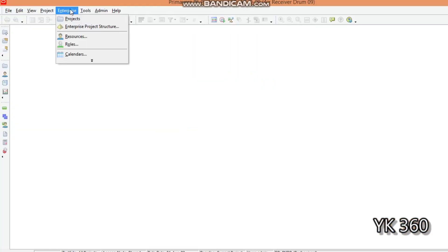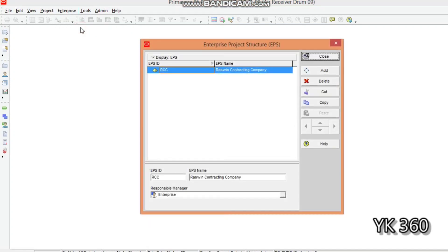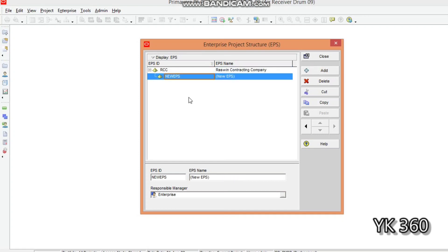To create a new EPS in Primavera software, go to the menu bar and open the Enterprise tab. Click the Enterprise tab and select the second option — Enterprise Project Structure. You can see there is already one EPS created from a previous lesson. To create a new EPS, click the Add button. The new EPS appears under the existing one, making it a child EPS. To make it a separate parent EPS, click the arrow to promote it.